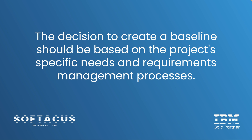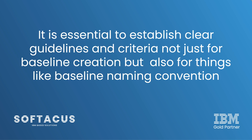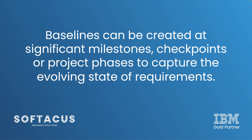It is very important to note that the decision to create a baseline should be based on your project-specific needs. To ensure consistency and effective management of requirements throughout the project lifecycle, it is essential to establish clear guidelines and criteria — not just for baseline creation, but also for things like baseline naming conventions. You may create a baseline at significant milestones or project phases to capture the evolving state of requirements. Your specific milestones may be less significant, such as after every sprint or iteration, or more significant, such as the completion of a major deliverable or at the end of a development iteration. Create baselines whenever you need to mark important checkpoints in the project's progression, or whenever you need to allow for tracking changes and conducting impact analysis.